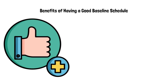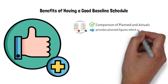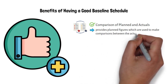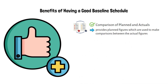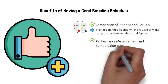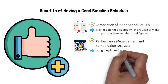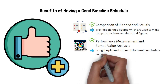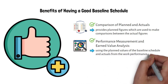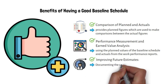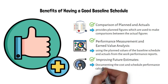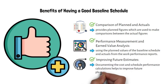Having a proper baseline provides many benefits to the project team. Three key benefits are: first, comparison of plan and actuals — the baseline schedule provides planned figures used to compare against actual figures; second, performance measurement and earned value analysis (EVA) — project teams can perform EVA using the planned values of the baseline schedule and actuals from work performance reports; and third, improving future estimates — documenting cost and schedule performance calculations helps improve future plans and estimates.